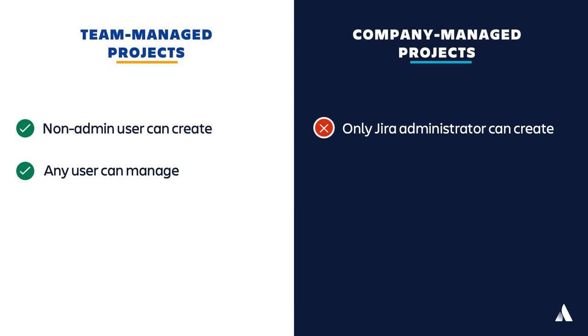Second, users who do not have any administration permission can fully manage a team-managed project. This is different to users with project administration level permissions in company-managed projects who are only able to manage a limited subset of configurations.